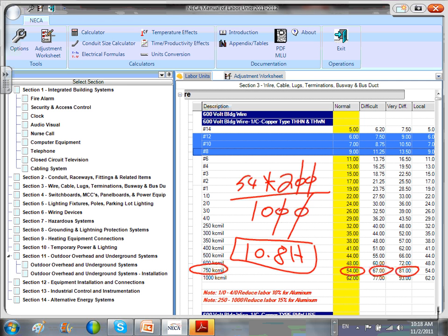Everybody get that? The software that we're going to be using next quarter for estimating is going to be using very similar units. They call them NECA 1, 2, and 3. 1 being the easiest, 3 being the hardest. That's exactly what you're looking at. When I say the hardest work, guys, it means a lot of factors. Heat, cool, access denied. You need to coordinate the access. All these factors that we studied, they're going to be located right in here.